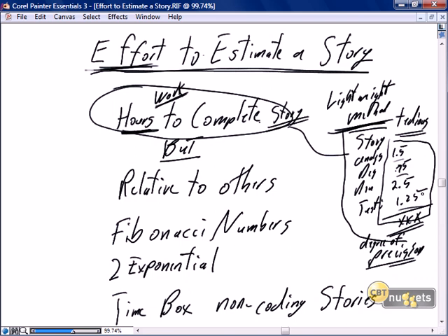And you can say, well, I can get around that by simply saying analysis is going to be two, design is going to be one, development is going to be three, and testing is going to be two by doing the roundup. But by doing that, we have significantly inflated our estimate, recognizing that a story should be completed in 1 to 2 days on average. So again, we need to find a more lightweight way of doing that, and I've already introduced you to that.